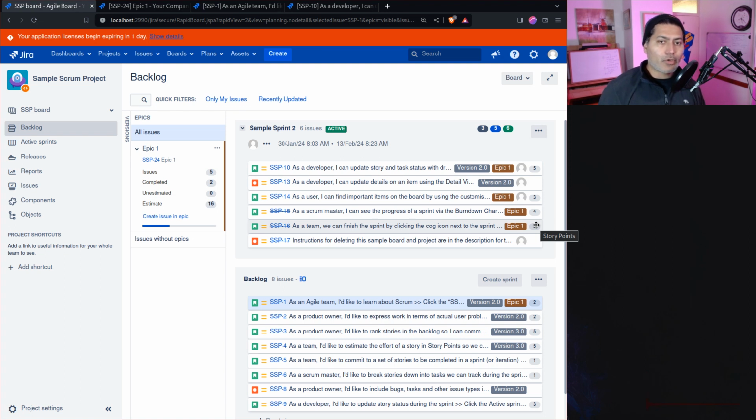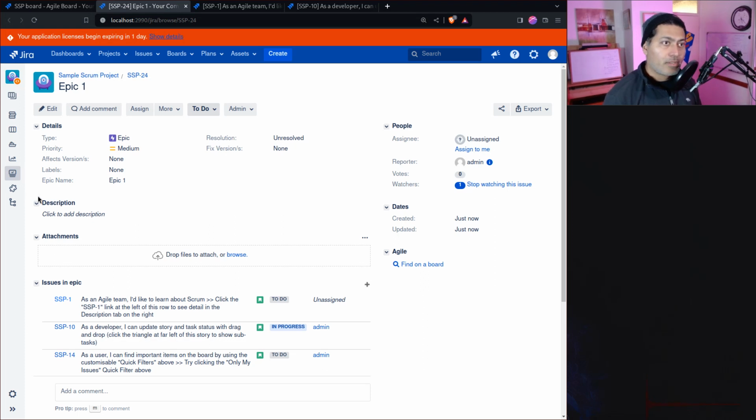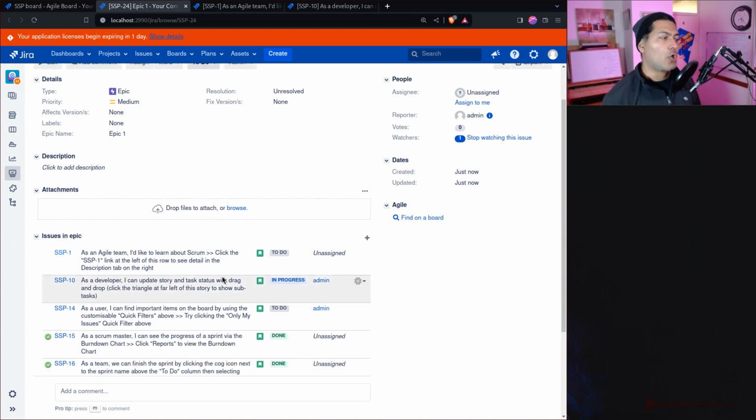And if we talk about doing this automation, let us say your users are insisting, please do it. So instead of updating the story points field automatically on the epic, you can always create a custom script field that will do this for you, like a total. Now, there's one problem. Imagine you have the story point field here. The way you should update this story point field at the epic level is basically making sure that there is some kind of a job running.